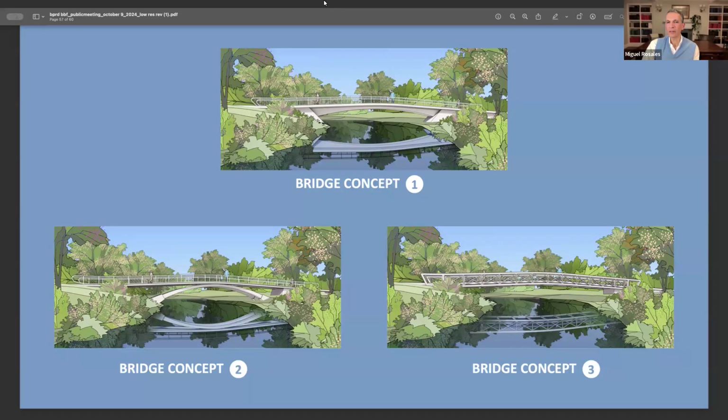Yeah, basically because these bridges are mostly steel, I would say that the amount of steel material is the main driver of the cost. But also the concrete, though in this case probably the steel. When we do the structural calculations, we can quantify all the different materials, and that's what they use for the cost estimate, and that comes from the computer software. So that's a good, effective way to do a fairly accurate cost estimate. Yep, thank you. That's great.